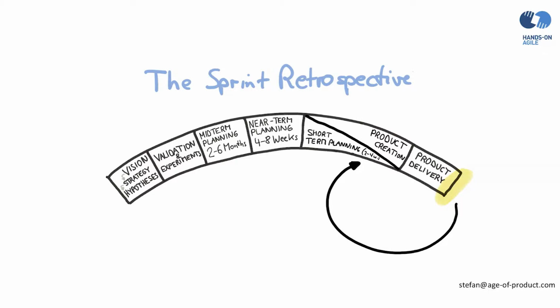The Scrum Master participates as a peer member in the meeting from the accountability over the Scrum process point of view. The Scrum Master is not merely facilitating the retrospective. The purpose of the retrospective is to inspect how the last sprint went with regards to people, relationships, process, and tools, to identify and order major items that went well and potential improvements, and to create a plan for implementing improvements to the way the Scrum team does its work.